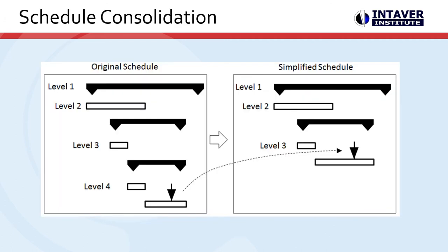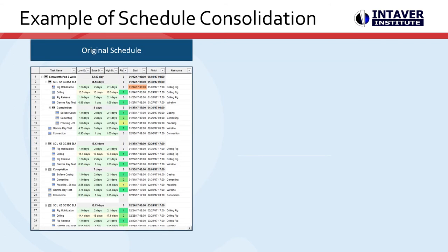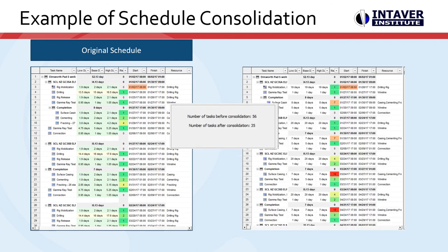Schedule consolidation uses a computer algorithm to combine sequential and/or similar repeated tasks while producing an equivalent schedule that preserves important schedule complexities and provides a valid analysis. Here we can see the results of a consolidation on this small schedule — there is over a 35% reduction in the number of tasks. This reduces the effort to create and manage your risk model over the life of your project.